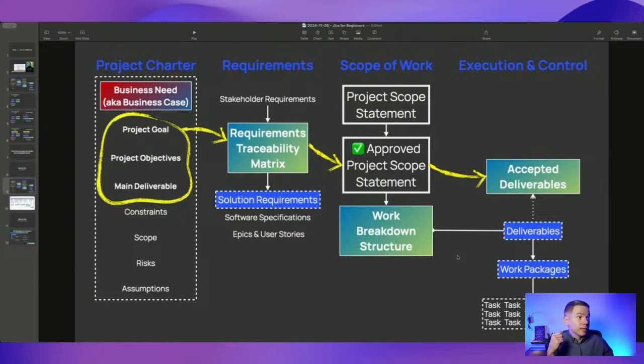So you will just substitute deliverables and work packages with some kind of epics and features to organize all the work. You may also consider breaking down your requirements by phases of the product. And I'm not talking about phases as in inception, planning, and so on. Phases of the product are just releases, where you may have some quarterly cycle, and it will be your additional issue type under which you will store all the requirements for that cycle.